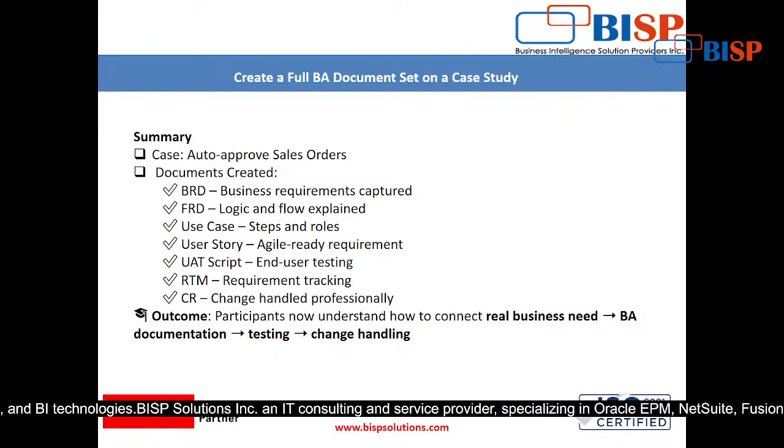once the document is reviewed, and the requirement is reasonable, the demand is reasonable, in that case, again the same procedure. Again you have to put that requirement everywhere in the business documentation, like BRD, then in the FRD also, and then use case also. All those documents will be updated, and after that it is called okay, all the changes are handled successfully and properly, right?